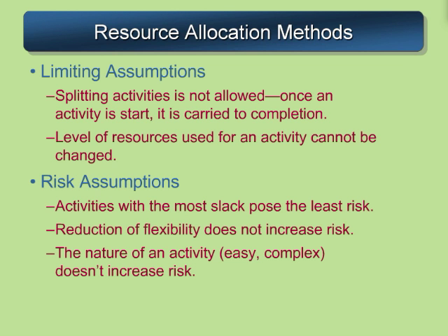When we go ahead and do these problems either by hand or with a computer, we've got to make some assumptions about what we're going to do regarding our resources and regarding our tasks. And if we go back to holding true to form on what we mean by an activity, we would see that we wouldn't allow activities to be split. Once an activity is started, we'll assume it's carried to completion.